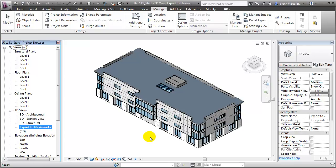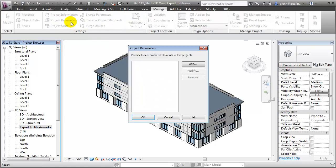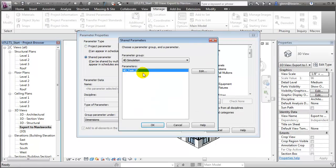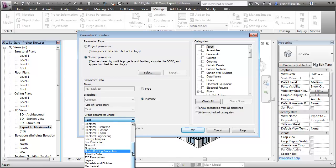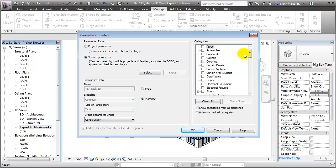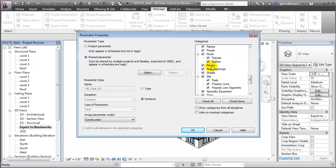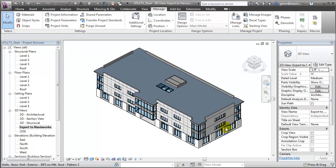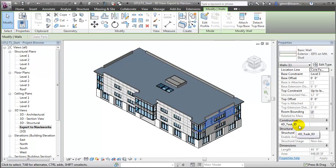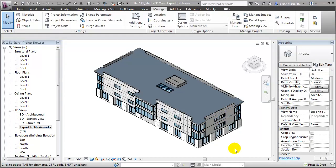Having created the shared parameter, now let's create a project parameter and associate it with each of the different building elements. We'll choose Project Parameters, add one, and we'll choose from amongst the shared parameters already defined — we'll choose that 4D Task ID. Let's group it so that it appears in the Properties palette under the Construction grouping. Then we can choose the elements we want to associate it with. We can select All, but it really isn't appropriate to associate that with everything — for example, the areas and the views — we should uncheck any categories where a construction task wouldn't apply. Say OK. And now when we choose a building element and look in the Properties palette, you'll see that the 4D Task ID parameter is available for us to enter values.